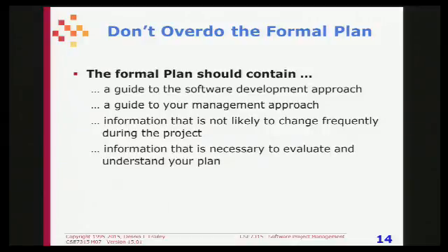In general, you put things in the plan that you're not likely to have to make a lot of changes to. If it's something that's detailed or something that may change a lot, for example, a schedule, you don't normally put the schedule in your plan. You put the schedule somewhere on the web or something, and the plan may have a link to where it's located. And then you can constantly change the schedule without having to update the plan.